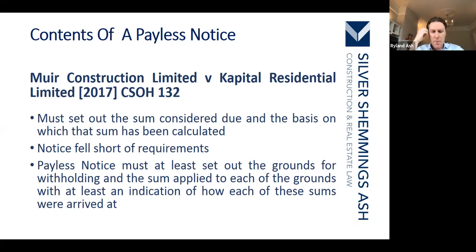And there's a test that should be applied, which is that of the reasonable recipient. If a reasonable recipient would have taken a Payless notice, or a document that purports to be a Payless notice, to be such a document, then the answer is it is. If it's unclear, for example, we'll see a contrary judgment, the Jawabi case, coming on later, where somebody just marks up an application for payment and sends it back. If it's unclear like that, then it won't be considered a valid Payless notice. So this is the case that sort of set the trend in that regard. And it's all about the reasonable recipient.